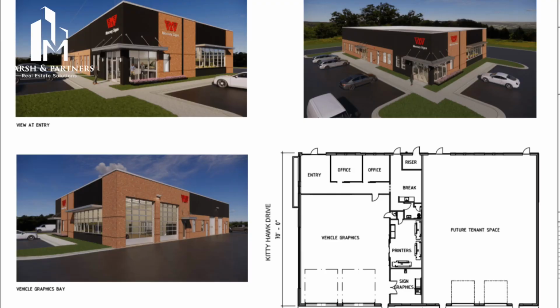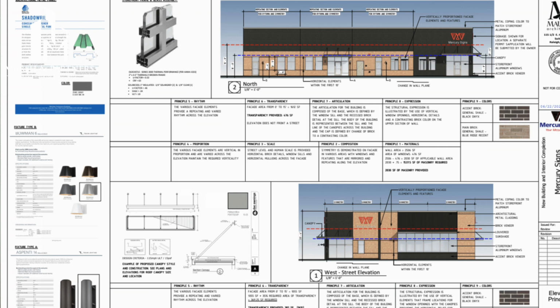Now, the last thing normally included in a site plan submittal set are architectural elevations. These aren't necessarily construction drawings, but most municipalities require some idea of what exterior materials you're going to use and what the building might look like architecturally. In some cases, you'll even need to include minimal floor plan details to show key safety and interior design features.